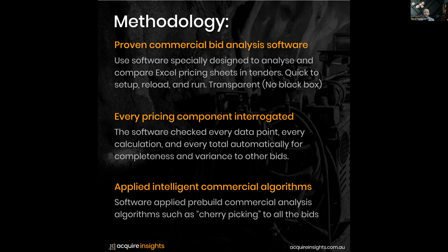Because I've been through a couple of tenders in my time where a contractor actually won a tender purely because they missed out a section and no one picked it up, and that made the bid significantly cheaper. If there are any contractors on board watching this, yes, these things do happen, and it's unfortunate, but we want to make sure everything is calculated correctly.